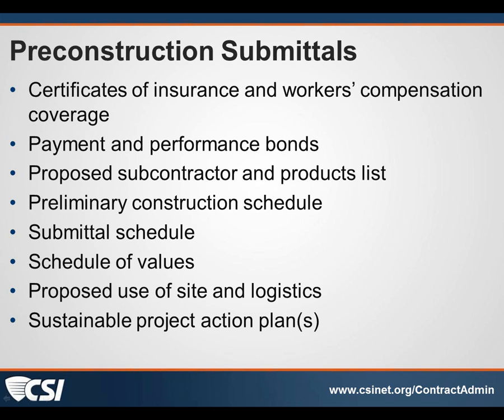So let's start with the first phase. Again, this design bid build format. So let's take a look at the pre-construction submittals. Generally, work shouldn't happen before these items are pulled together. Even though in many occasions the parties are anxious to get the project clock running, there are important things here to be documented before any activity begins on a construction site.